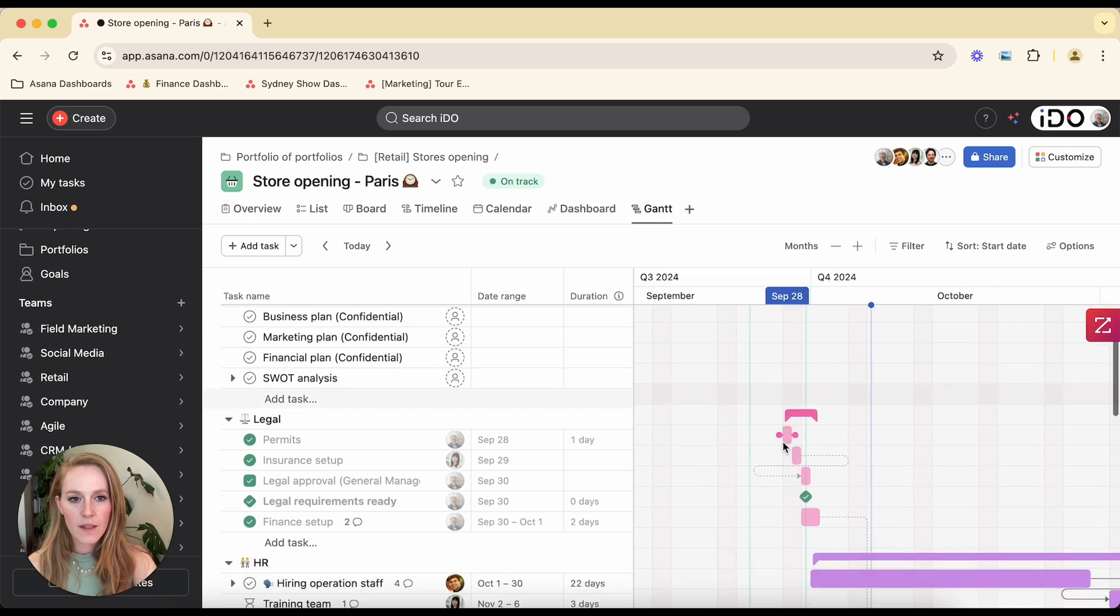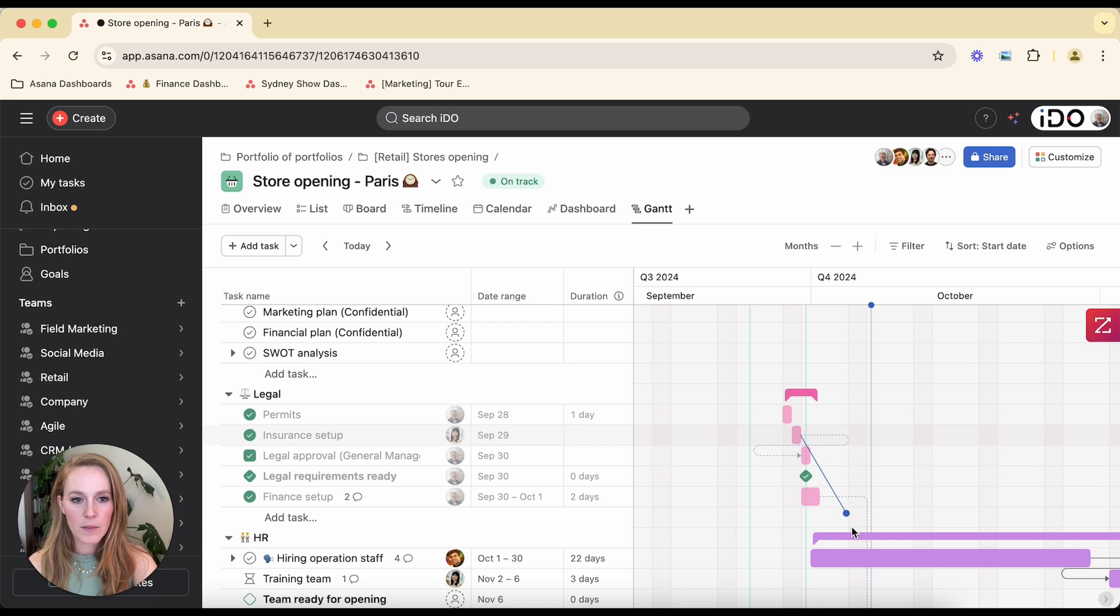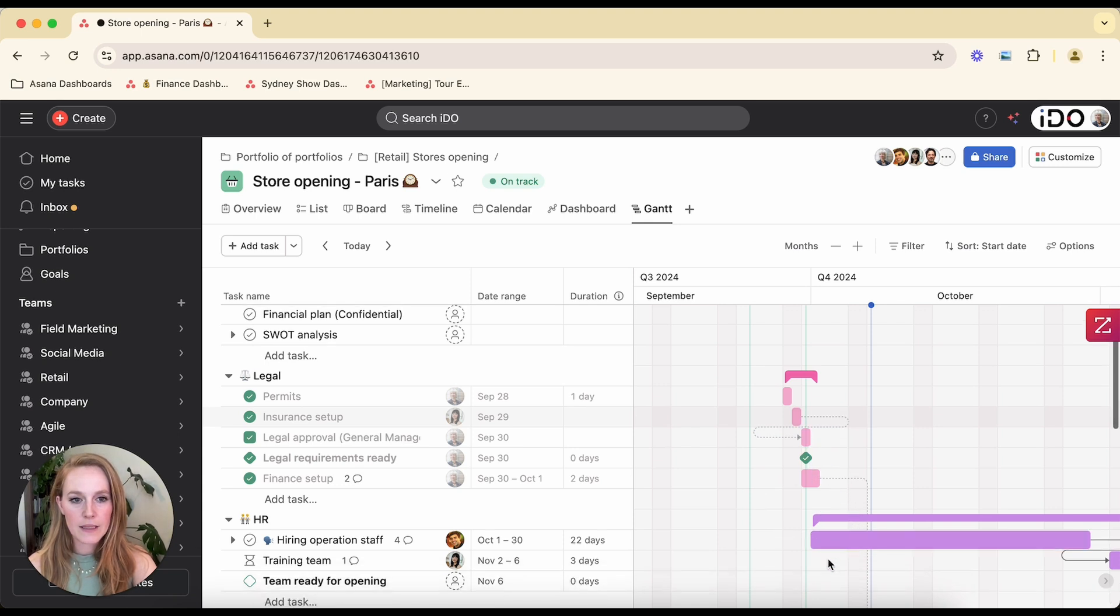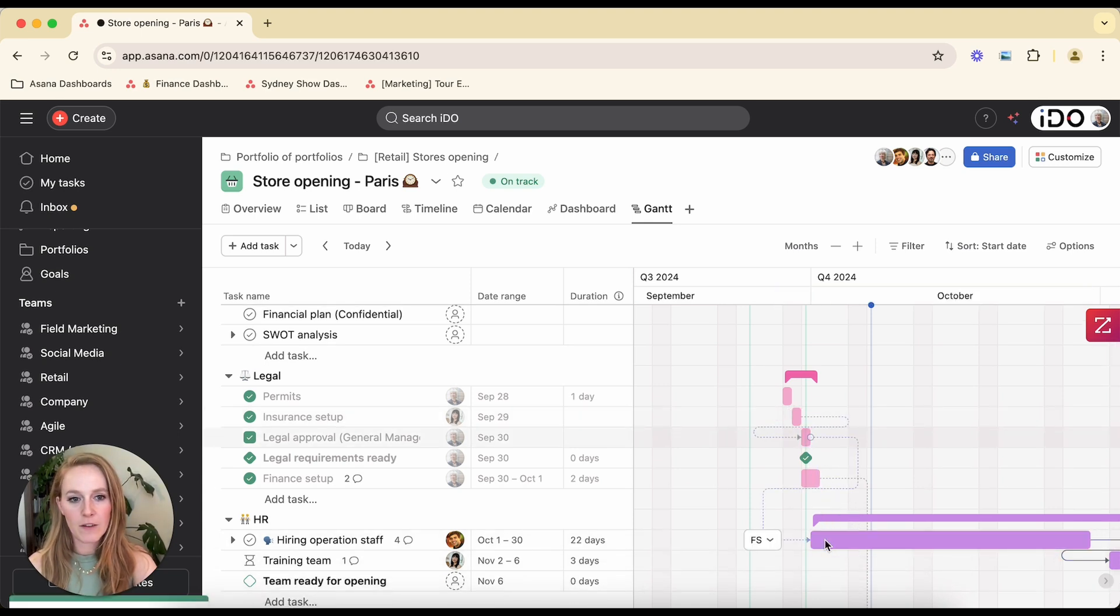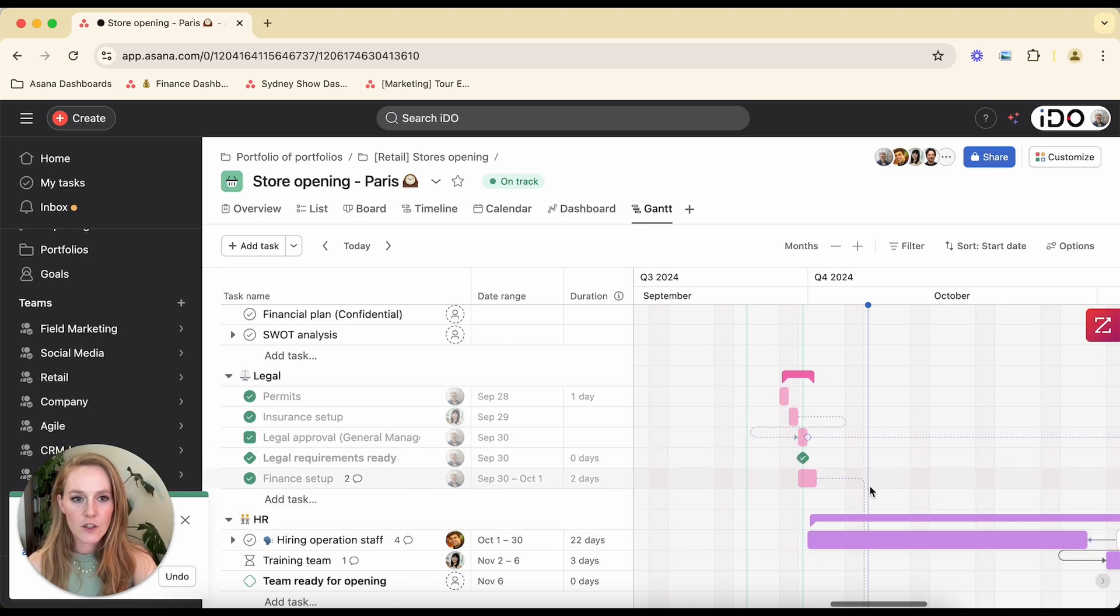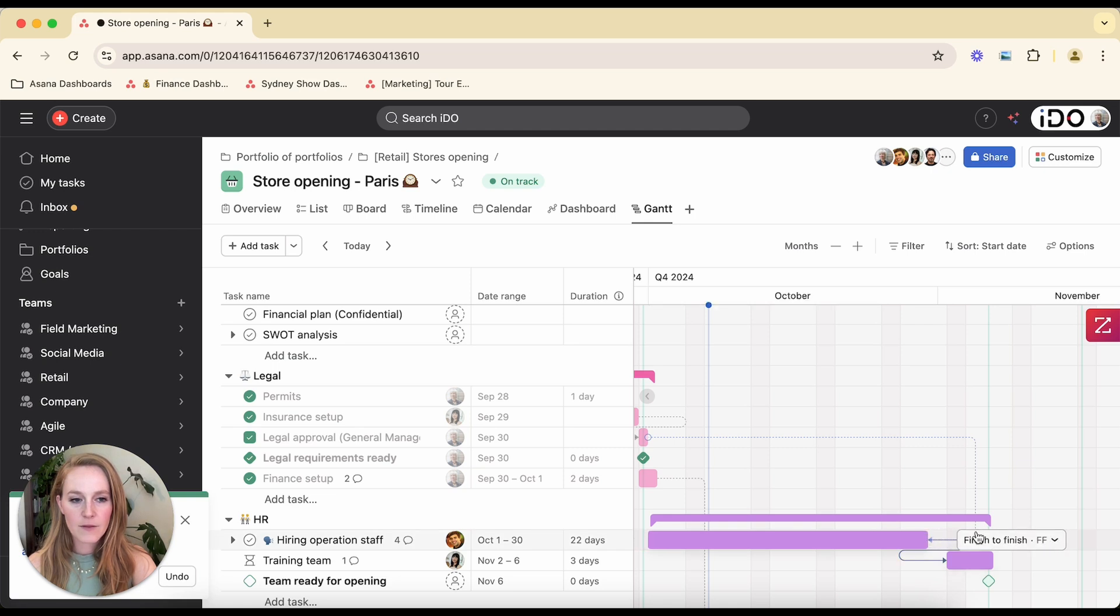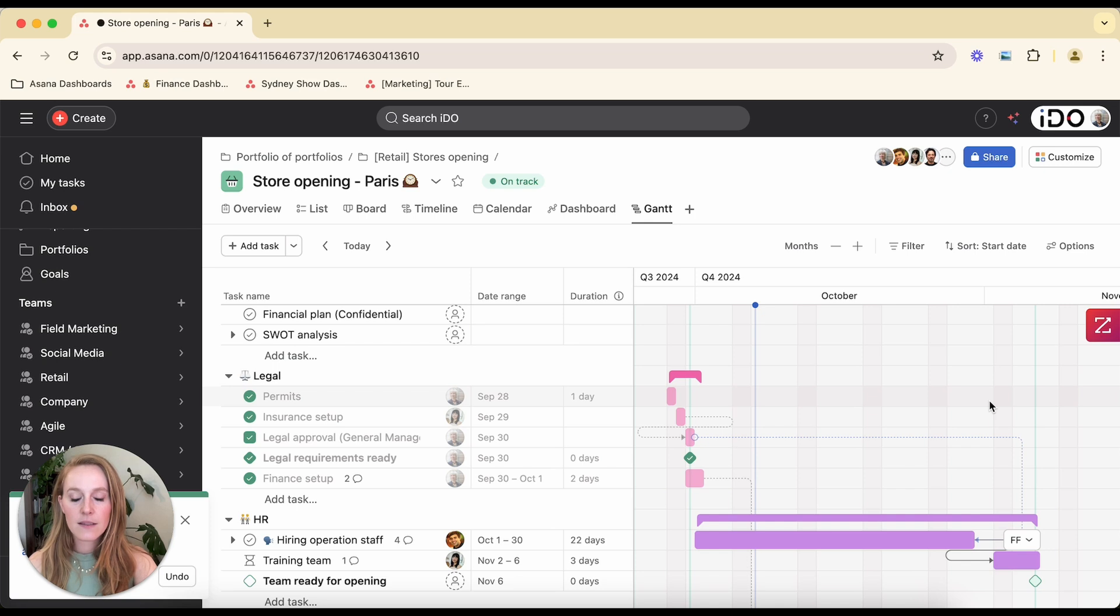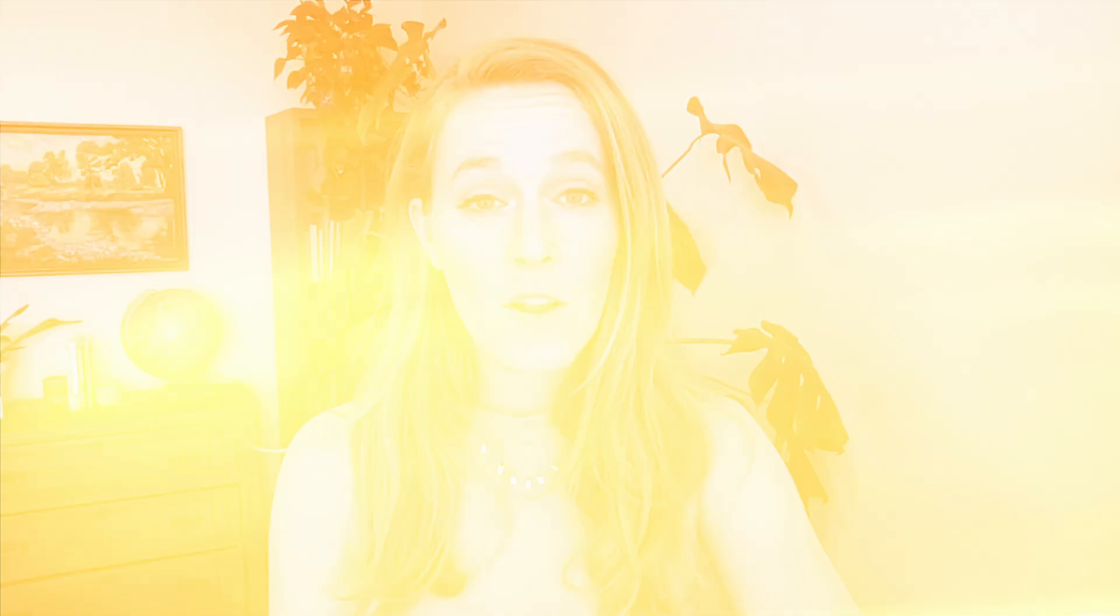So if we go to the Gantt view, we can see those same arrows and we have that same capability to drag and drop dependencies based on finish to finish or finish to start or whatever you might need. You can see it automatically selected finish to start, but I could change that to finish to finish. And you'll see that that arrow is actually represented differently. And we see finish to finish right here. If you do need to change the due dates on these tasks, those dates will be updated based on the dependency that you have set.